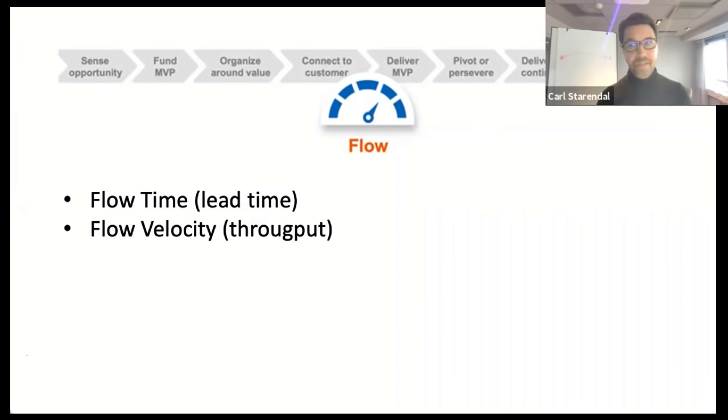Here I'm referencing again the terminology from the Flow Framework, and now also adopted by the SAFe framework. This might be called throughput in most other cases. It's simply, over time, how many completion events do we have for features? So I would look in a time box, I would look at the PI boundaries if I'm an RTE. Look, within a PI, how many features do we actually set a gold star on? Actually, they are done. They are valuable things in the field doing work. And I'm looking for that trend. Is it trending upwards or downwards?